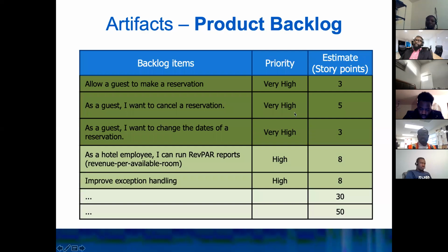And that's what we're going to be working on before. So everything that is on the top, that means that we need to pick them up for the most current or feature sprints. All right. So whenever we pick something from this backlog, we put it into the sprint backlog, right? It's out of this product backlog. And then anything else that is left is just going to go on the top, from the lowest priority to the highest priorities. And then the next sprint, we're going to be picking up the next highest, and then the next highest, the next sprint. Okay.